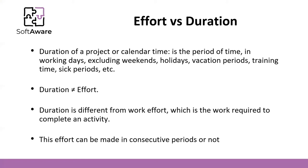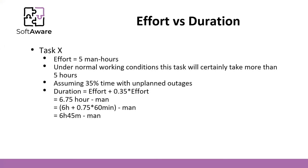But imagine that in your schedule — with classes, other projects, meetings — you can only dedicate one hour this week and one hour next week to that task. The calendar time you give your customer would be two weeks, despite the task only taking two hours of actual work. Furthermore, duration must account for unplanned outages: it is consensus that approximately 35% of time is lost to unplanned outages.